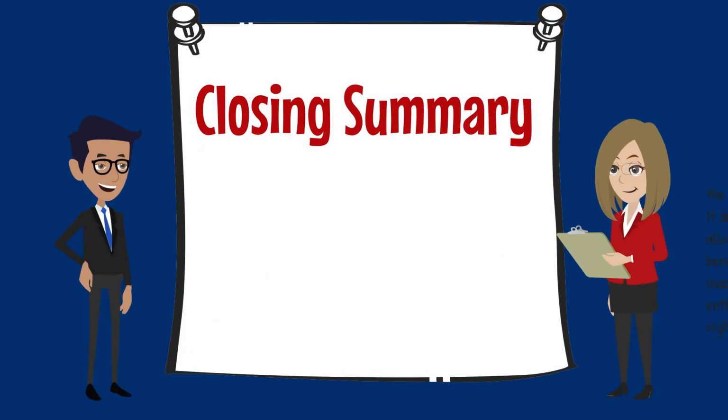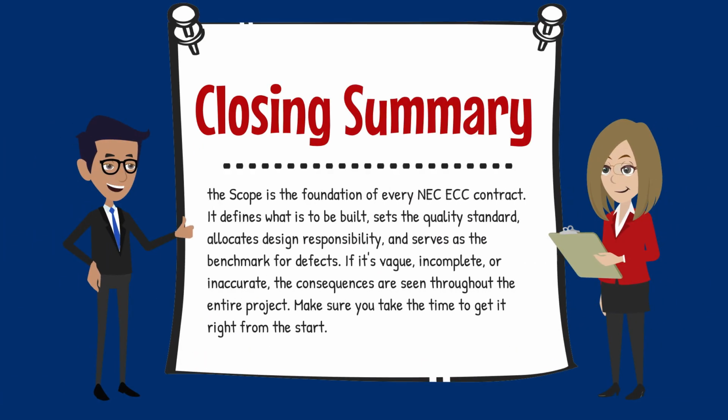In conclusion, the scope is the foundation of every NEC ECC contract. It defines what is to be built, sets the quality standard, allocates design responsibility, and serves as the benchmark for defects. If it is vague, incomplete, or inaccurate, the consequences are seen throughout the entire project. Make sure you take the time to get it right from the start.